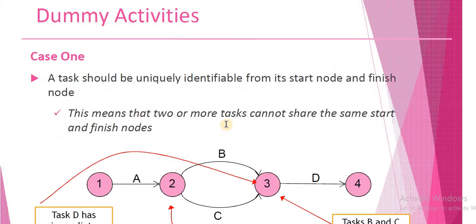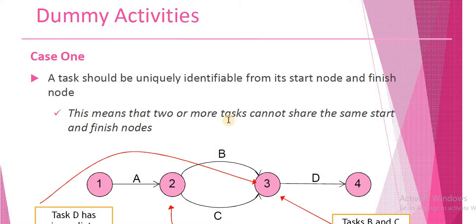Now let's take a look at some cases where we have to use dummy activities to maintain the clarity of the diagram and to preserve the precedence relationship among the activities. The first case: a task should be uniquely identifiable from its start node and finish node. This means that two or more tasks cannot share the same start and finish nodes.